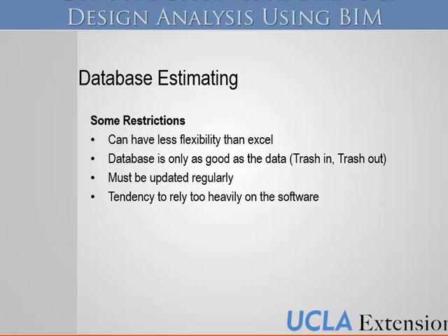So that's why we carry contingencies. Usually you'll have a design contingency, meaning that's going to be added scope. What would be covered under that is if the architect added a new stairwell that wasn't there at all. That's why you have contingencies at sometimes up to 5%.